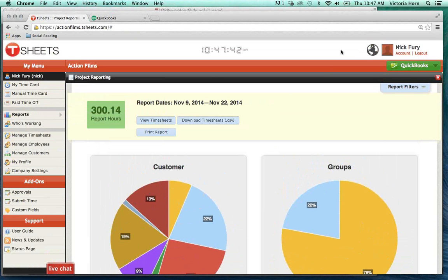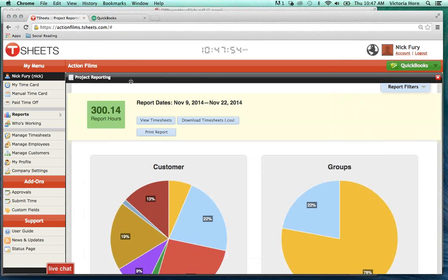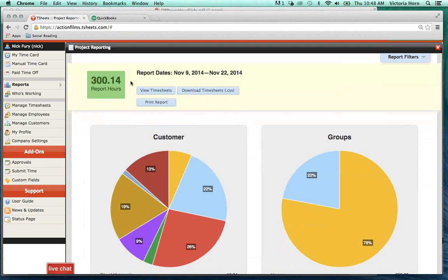Okay, so what you're saying, Victoria, Michelle specifically said you cannot do payroll job costing in QBO. But if you have TSheets and you are tracking all your employees' hours by job, you could essentially, if you really wanted to estimate your payroll cost per employee, use the TSheets reporting tool, getting the total number of hours per job, multiplying it times their wage and whatever the labor burden is, and estimate your total labor cost by job using TSheets by doing that sequence of events, correct? Exactly. Okay, thank you. Yeah, of course.